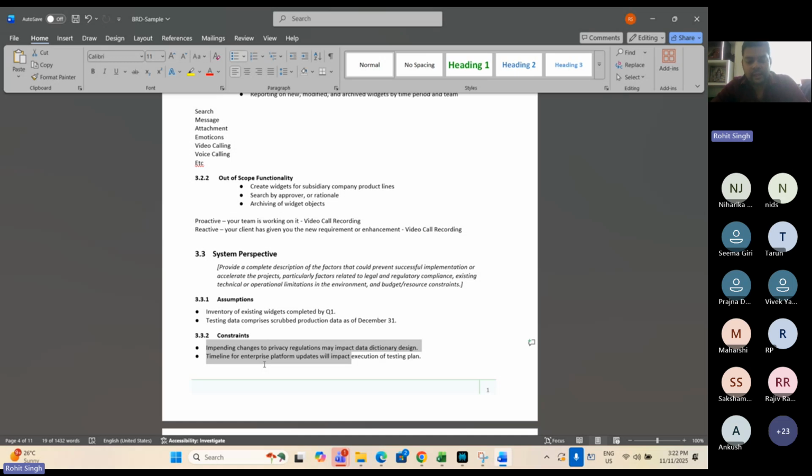So there's a change. If it is changing, it has an impact. It requires resources, more technical stacks, and more time. So maybe not 12 months, it will now take 15 months, and not a $1 million project, it will now be a $1.2 million project.